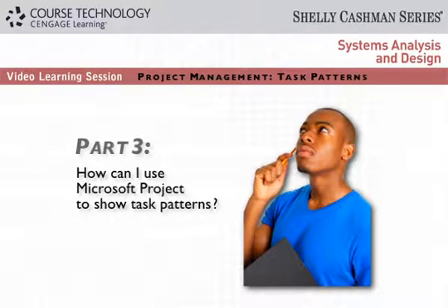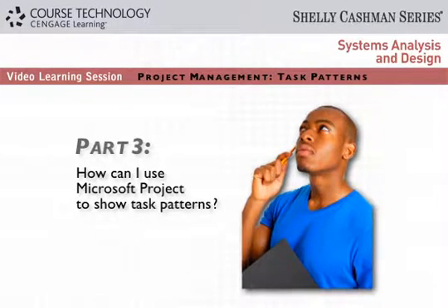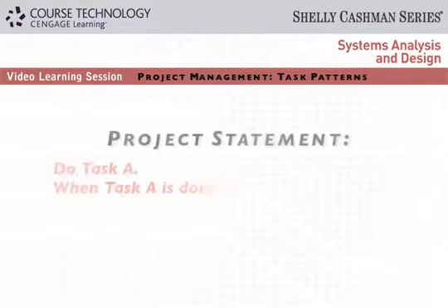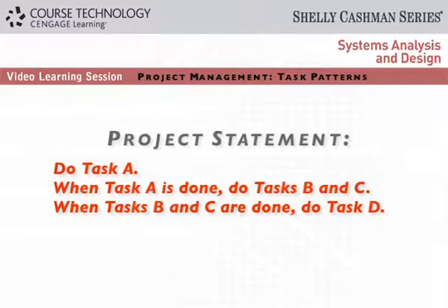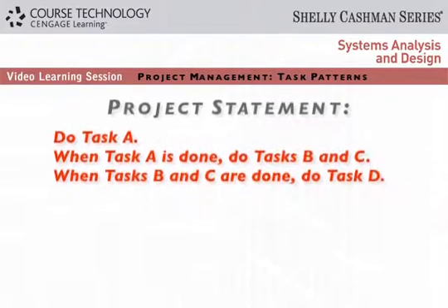Microsoft Project can analyze a work breakdown structure and display task patterns. Here is a simple example. Here is a very simple project statement. Do Task A. When Task A is done, do Tasks B and C. When Tasks B and C are done, do Task D.